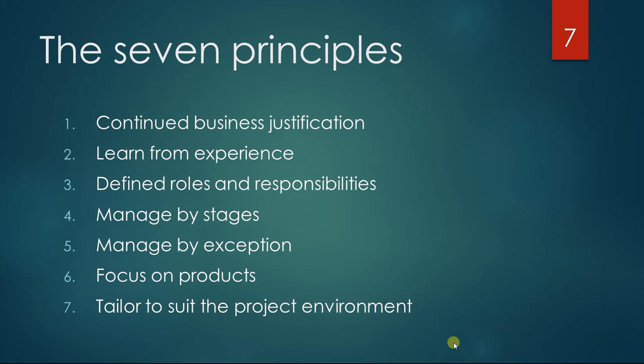And then the project board can delegate the work to the project manager and reduce the tolerances a bit and say you can do the next stage, or this project needs to be done between 10 and 11 million. And then the project manager can divide the project into small work packages that he can delegate to a team manager, and he can set a tolerance on that.